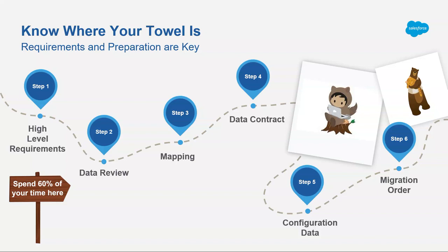It's necessary to define the sequence of your migration so that you're setting up the lookup values and the relationships appropriately. So you need to think about that up front. And also, it's good information for development. So once you've gone through all of this paperwork and exception handling and reviewing it with the client about 10 times, you're all on the same page, you now have a data contract with the mapping document.